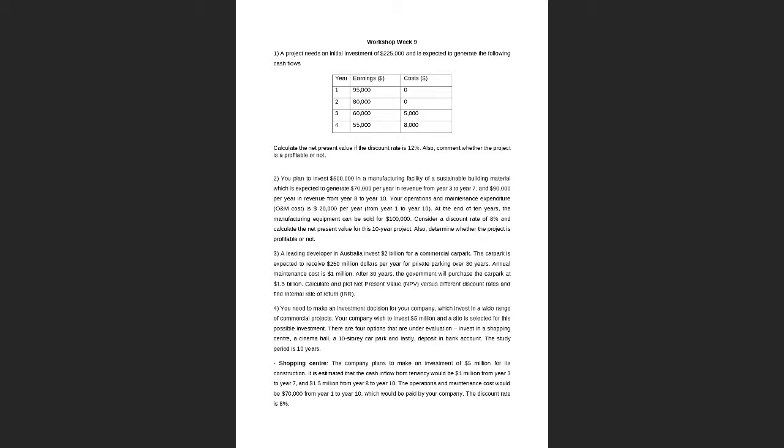Okay, so yes. The question was, what is the relationship between IRR and net present value? Internal rate of return is that rate at which your net present value becomes 0, right? And we are going to use this concept to find the IRR here. Yes, Victor, you're right. Doris, IRR is the rate when net present value is equal to 0. Yes, that's right.